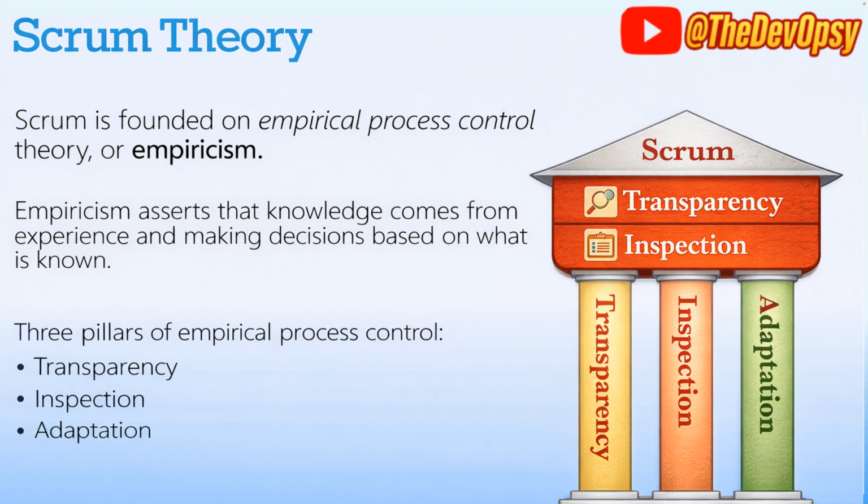We should also have common terminology, right? For example, when we say that a particular item has been completed, that should be the same understanding for all the members of the team. When I was a developer, I used to finish coding and say, okay, it's done. But maybe I did not check the testing policies, maybe negative testing, stress testing, etc. I did not think about what would happen if somebody put in this value, it might break. All these things should be taken into consideration, and it should be generic for all the team members. That is called the definition of done. We'll come to that part.